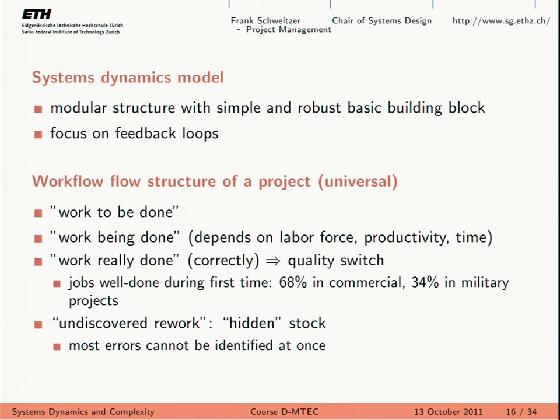The US Navy, in fact, inspected this model, and I mean scrutinized the model really. They came up with some criticism for the methodology, for the estimations of the costs of the different changes, different tasks, and so on. And they expected that these modifications would greatly reduce the impact of the small changes. But when the shipbuilding company implemented these critiques, the overall impact was actually higher. All right? So the US Navy did not expect that by decreasing the cost of some of the tasks, they would actually get a higher impact.